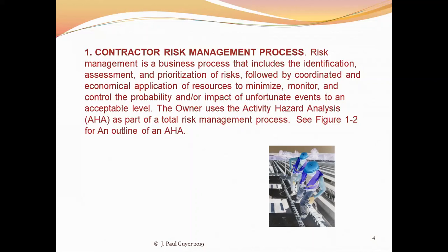And you could probably, in a way, if you want to, as your own methodology, use kind of a point system, 1 to 10. There's a 1 to 10 possibility that this particular hazard will be realized.